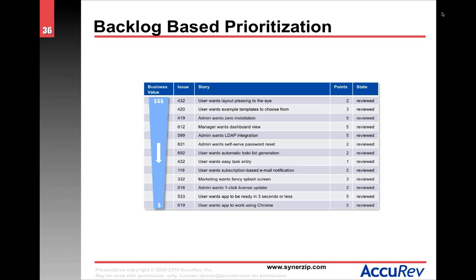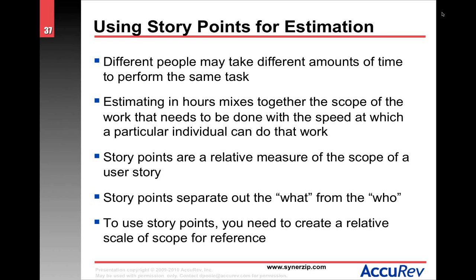And if the person says, no, I have to have it, then you say, okay, are you going to increase resources, or are you going to move something else out? Oh, well, I don't want either of those. Okay, then again, I guess we agree that that's not going into this release. Thank you very much. The idea is that even though it may have a silly sounding name, it actually has a lot of value.